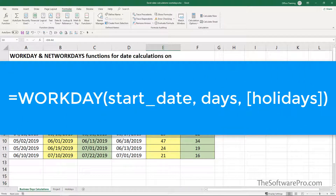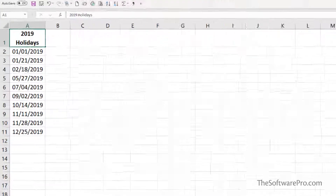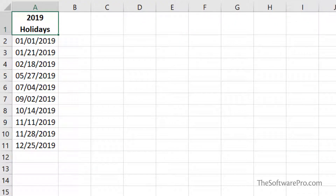Let's start with the Workday function. There are three parts to this: the start day, the number of days you want to add, and holidays you want to exclude — this last argument is optional. If you'd like to exclude holidays in addition to weekends, create a range of holidays to refer to in the formula. I'll reference standard US government holidays. Create your own list as needed, which may include multiple years.